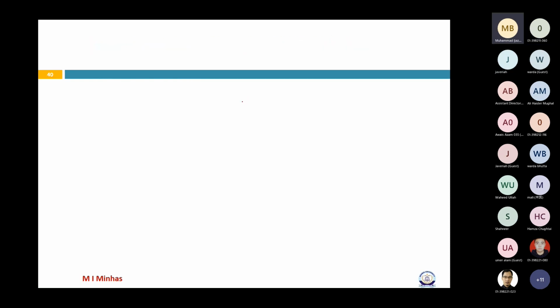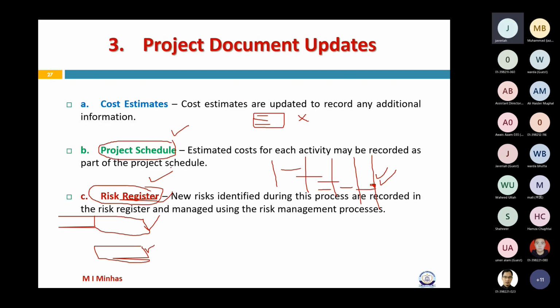No sir, just tell us like that. Okay, new risks will come. Yes, see, when you are defining a budget and you reconcile, previously your duration was 7 months, and the deadline from the customer is 9 months. Now you have reconciled your activities and because of that, now your duration is almost 9 months. But now there's a risk that you may get delayed. This deadline might be missed. This is a risk, correct?